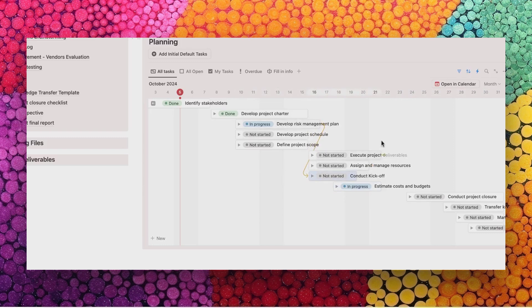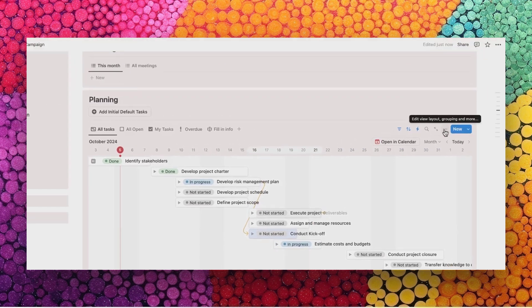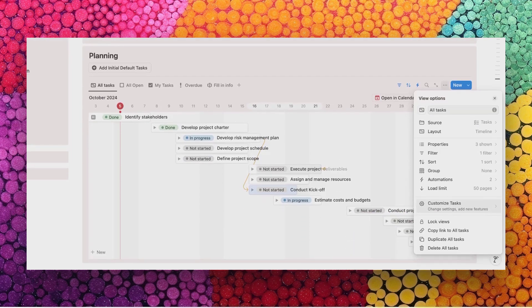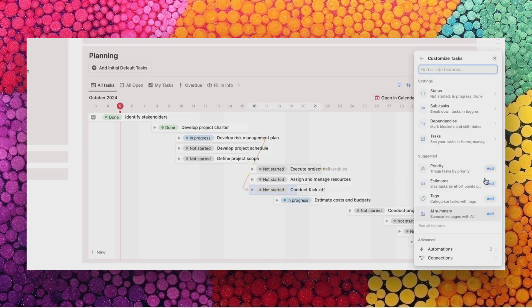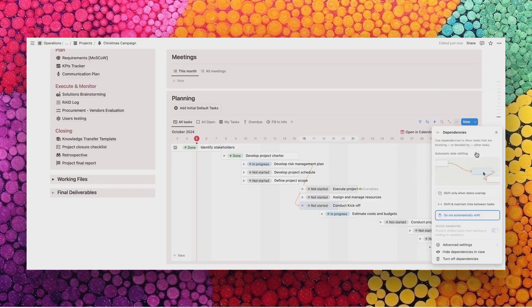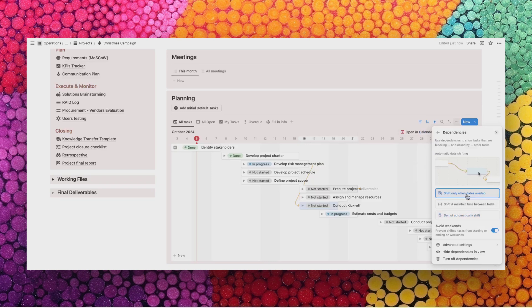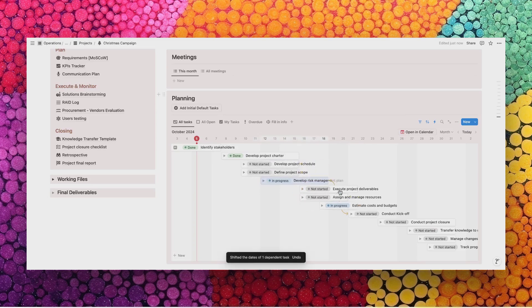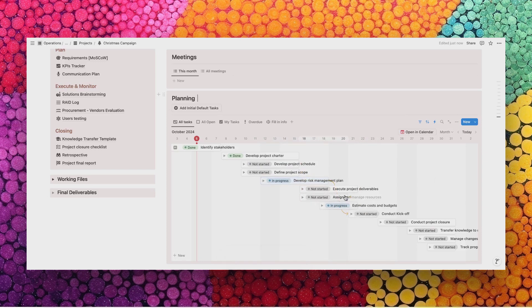Then you switch on the dependencies functionality and it will appear on your timeline. If you want to change how those appear, you can go into the options of the timeline. Be careful as here you are modifying the options for all the projects, not only this one. Within the dependencies menu, you can change how the different tasks shift when they overlap. Just select that option, click somewhere outside of the menu and the setting is saved. And now, if you move one of the tasks further, then the one that is dependent on it would move as well. I didn't want to add this functionality by default because it might seem a bit strict and complicated at first, but feel free to activate this for your projects.